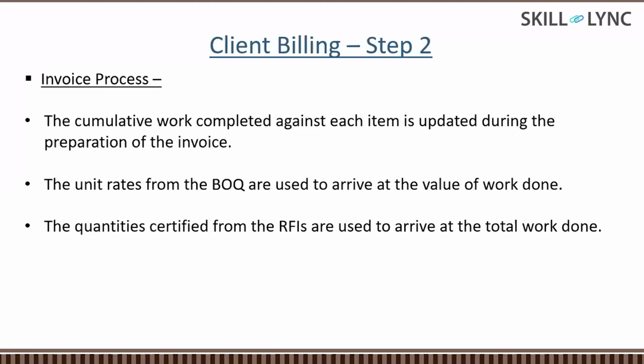Then with each subpart of it, let's say somewhere one room is getting constructed, somewhere foundation work is going on, somewhere brickwork is going on, somewhere finishing work, plastering, somewhere painting is going on. So then the billing engineer will be taking the quantity of all these items. It's not like only concrete will be happening or it's a small bill. So they have to take and compile the quantities of the entire project, whatever has been executed.